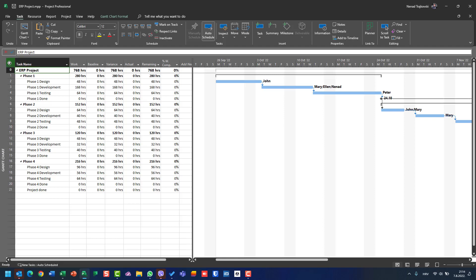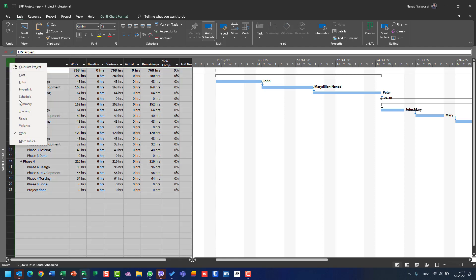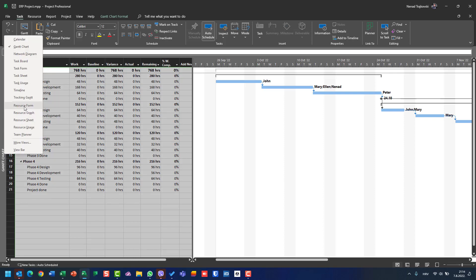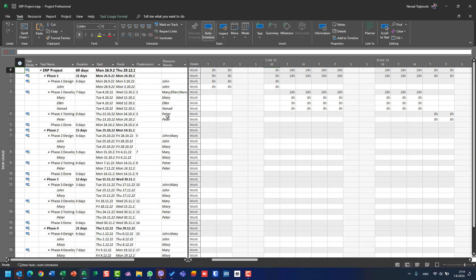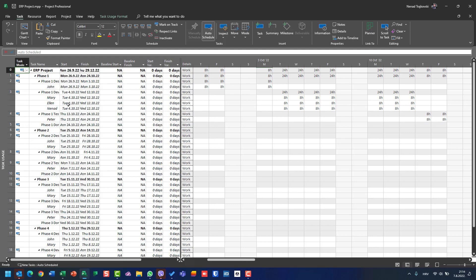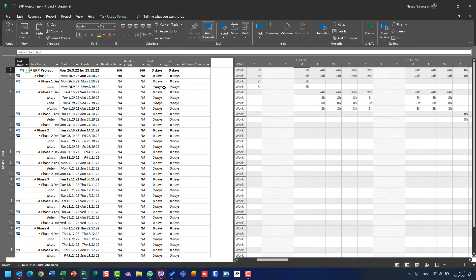Let's go back to Task Usage view. In Task Usage view I will have Entry, and I can choose a third table — let's say Variance. I will see baseline start, baseline finish, start variance, and finish variance. I didn't create a baseline yet, so let me create one — Set Baseline. Now I am looking at Task Usage view with the Variance table.